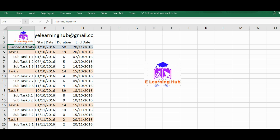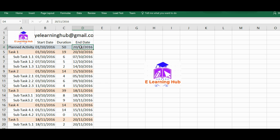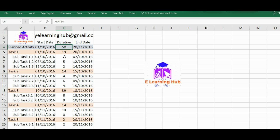That's already there in column A. Then start date of different activities, that's there in column B. Then either duration or end date. We need to have either the duration of this particular activity or when it will be ending. So if you have end date, then you can just type start date and end date, just subtract, you will be getting the duration.